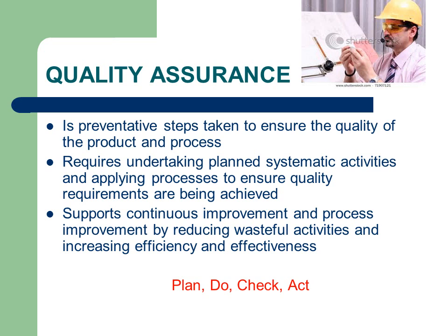Quality assurance. Quality assurance is all the planned and systematic activities implemented within the project to provide confidence that the project will satisfy the relevant quality standards and customer requirements. Quality assurance activities should be planned during the planning phase and included in the quality plan. They should then be performed throughout the project and reviewed for their effectiveness. This creates a continuous improvement cycle where wasteful or inefficient activities can be improved, thus increasing efficiency and effectiveness of project processes.